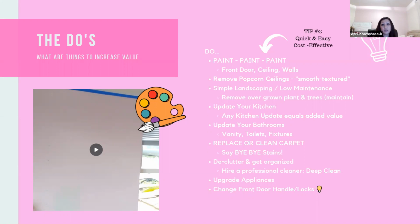And then how you know it has equity is basically you want to do the math, figure out what it's worth, and subtract how much you're going to remodel it. An easy way to do it is to figure out what price it's selling for, or if you are under contract, you figure out how much money you can rehab. So you can do it backwards. Let's say it's worth $500,000, and after you did your math, you have a contract of $400,000, then there's a spread of $100,000, right? So if you were to renovate this house, I would not renovate more than $100,000, because that's all you have in it, because then you'll be upside down.